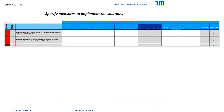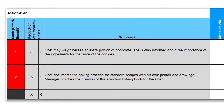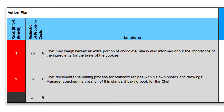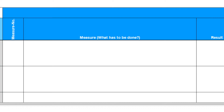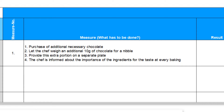On the left side of the action list in SigmaGuide, the developed solutions are listed with the effort-benefit rank and the expected reduction of problem costs if the causes are under control. In the next columns, the solutions can be specified as concrete measures. First break down the solution into concrete tasks and arrange the tasks in chronological order. For our taste problem, we will purchase additional chocolate, let the chef weigh an additional 10 grams of chocolate for her nibble, and we will provide this extra portion on a separate plate.